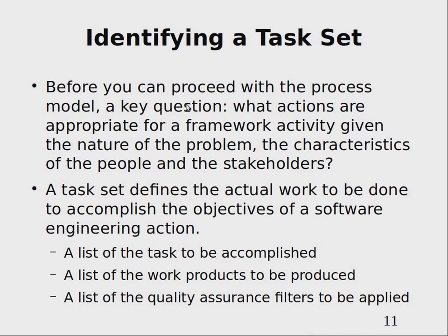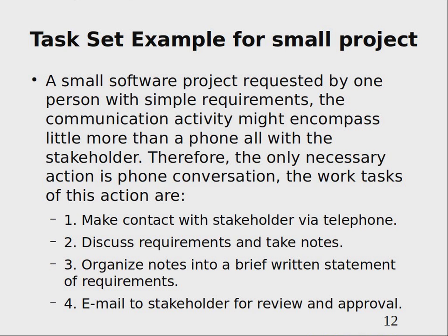And then you sooner or later need to divide and conquer. You need to split larger activities into smaller activities and tasks and even smaller tasks. So you need to understand how you will deal with large activities and complex things, so that you can make them small enough, simple enough, that a single person can do it in some particular amount of time.